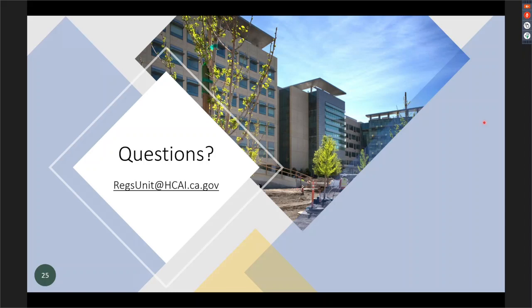It's a clarification. It wasn't there before. I'm clarifying that this diffuser needs to be connected to the rest of the return line or the exhaust line, that's now non-material. It just wasn't fully clear on the drawings. You're clarifying the information. It is a non-material change because you are changing what was on the drawing because it wasn't there previously. And again, there's a fine line there. You're going to probably see it go both ways, but that's what we're saying. There are some things we do not need to see. And that's actually to your benefit.